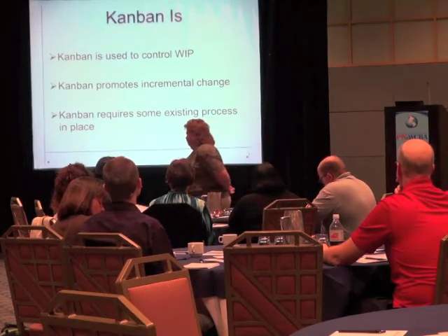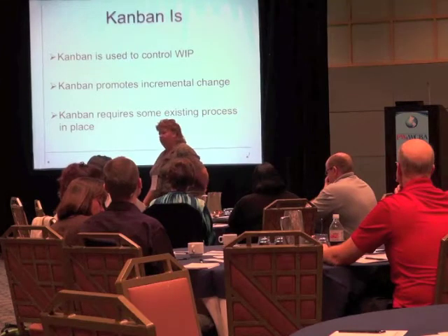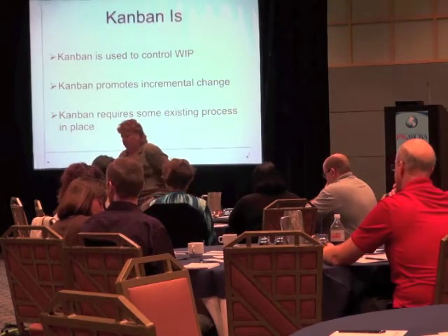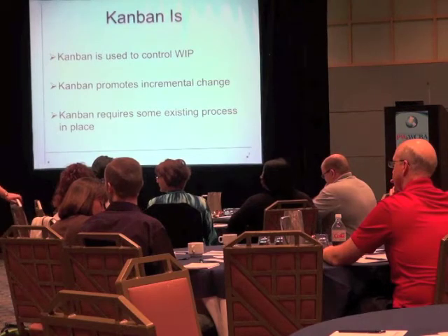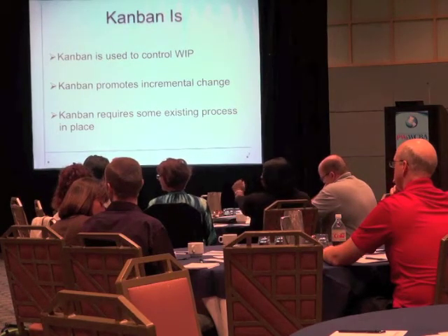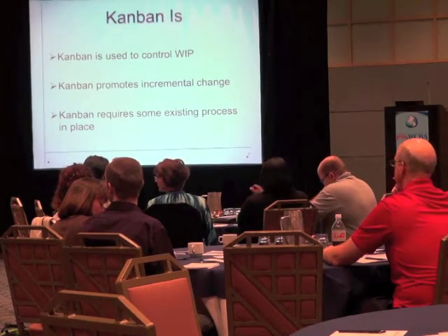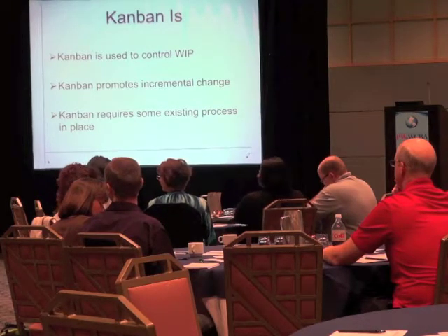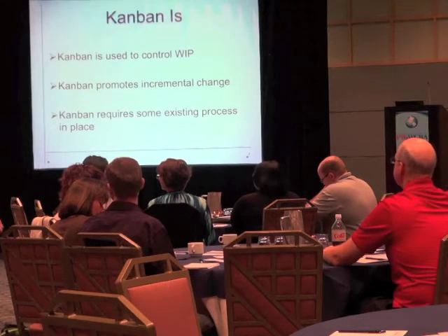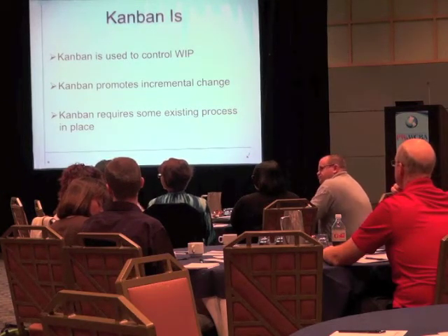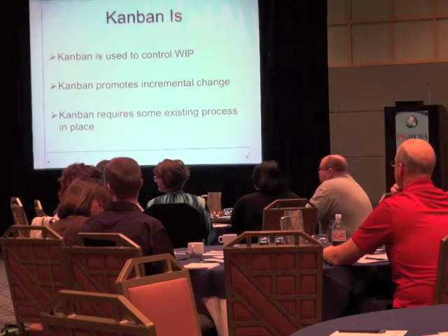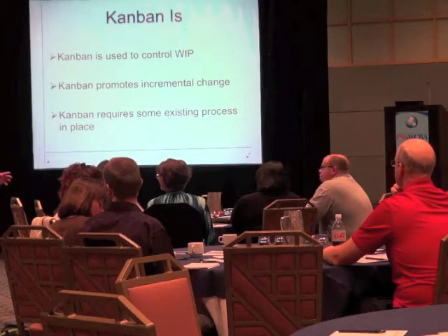Okay. Questions so far? Yes? So we talked about the different queues. Is the buffer a queue or is it just a period of time? It's a queue. What is in that queue? What happens in that queue? Good question, thank you. So the question is, what happens in the buffer queue? Essentially, the buffer queue is a place work sits and waits. Right? So like it's ready for testing. Yes, but the tester hasn't picked it up yet, so it's not really in testing.